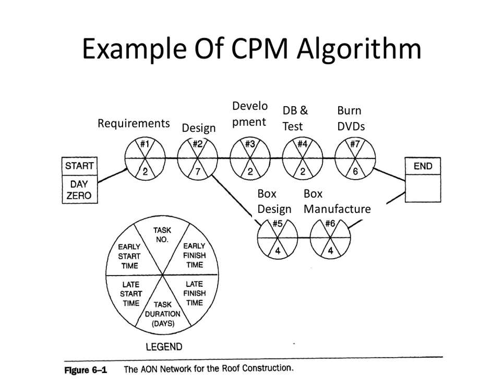So now we're in the lower one here, task number 5. What's the earliest it could start? 9 as well. Okay. It can be going on in parallel with task 3, right? And for that matter, task 4, task 7, yes, task 7. What's the earliest it could finish? 13. Good. What's the earliest this next task could start? 13 and finish? Good. Great. Okay. Now, what is the earliest the entire project can finish?